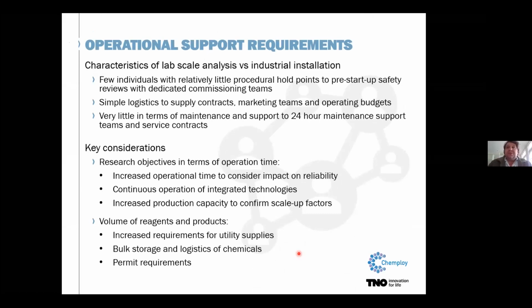Then lastly, operational support requirements. What you look at here in terms of operational support at small scale is really just a few individuals with relatively little in terms of procedural hold points in handing over to somebody, or it's probably the scientists themselves that are actually managing or working with the setup. You will get to a very formalized procedure of hold and handover process, safety reviews, and dedicated commissioning teams for the larger scale units.